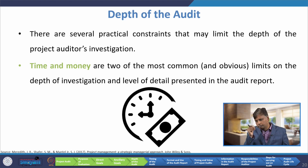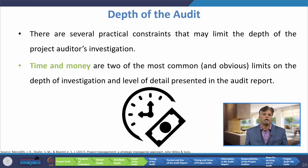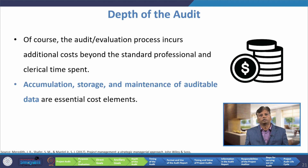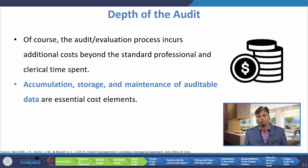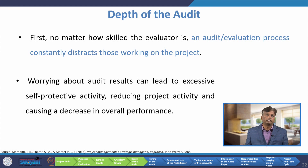Now we will discuss about the depth of the audit. There are several practical constraints that may limit the depth of the project auditor's investigation. The two important limitations are time and money — time and money are the most common limits on the depth of the investigation and the level of detail in the audit report. The audit evaluation process incurs additional cost beyond standard professional and clerical time. Accumulation, storage, and maintenance of auditable data are essential cost elements. No matter how skilled the evaluator is, an audit or evaluation process constantly distracts those working on the project. Worrying about audit results can lead to excessive self-protective activity, reducing project activity and causing a decrease in overall performance.